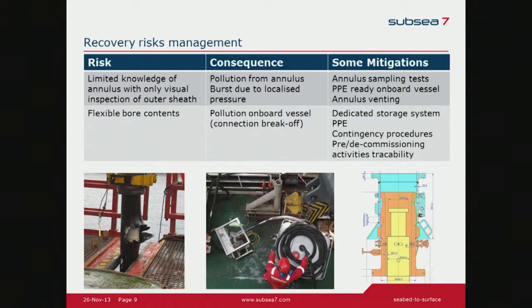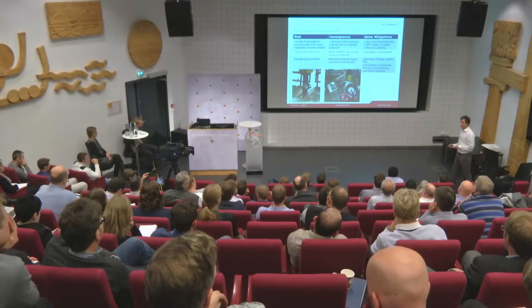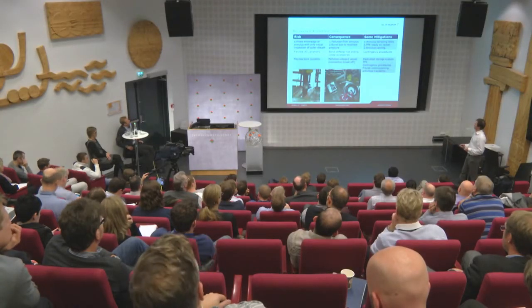OD deviation can also be expected, and in that case we may have challenges dealing with a sliding bend stiffener. This is the case for a non-FPSO, for example. On the other hand, we can have the risk of loose accessories if the OD is decreasing. We don't have magic plans for that, but the aim is to plan contingency procedures should this happen, which is sometimes very challenging to put in place.